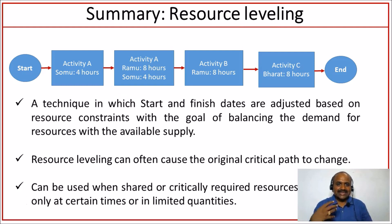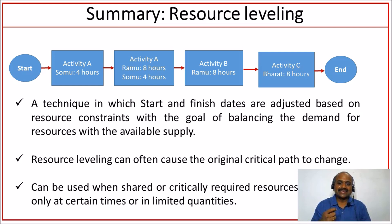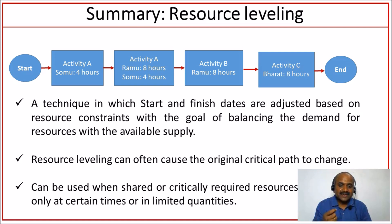In summary, resource leveling is a technique in which start and finish dates are adjusted based on resource constraints, with the goal of balancing the demand for resources with the available supply. Resource leveling can often cause the original critical path to change, and this technique can be used when shared or critically required resources are available only at certain times or in limited quantities.